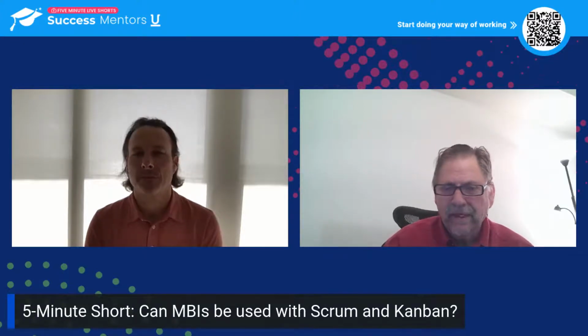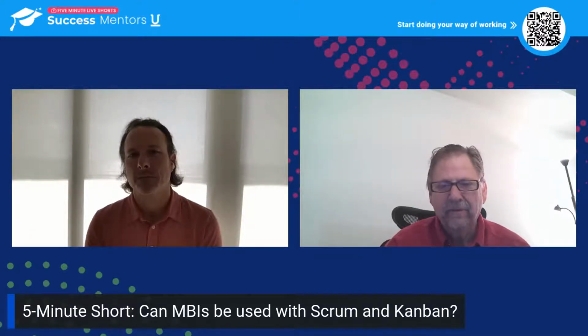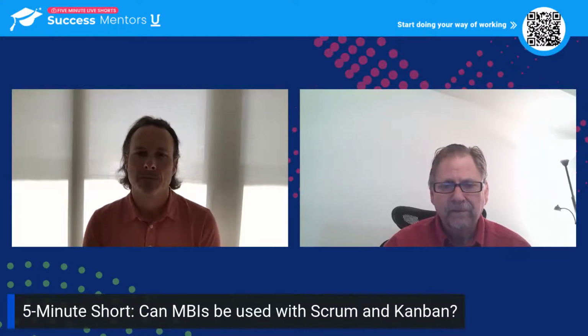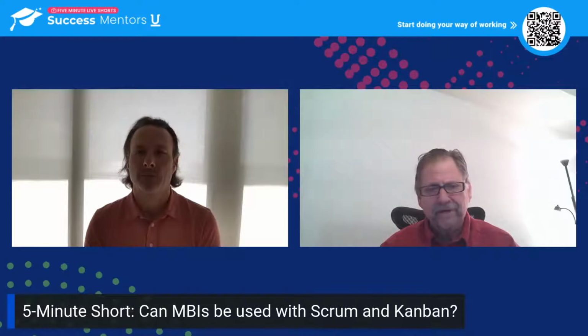Also, when you create your MBIs, you tend to not fill out the stories and features underneath them as much as you would otherwise, because you only need to create stories and features that are going to help support the MBI. Sometimes there's stuff in a feature I need for a second MBI or later on. The MBI guides you to have thinner stories and features so you can get things done sooner.